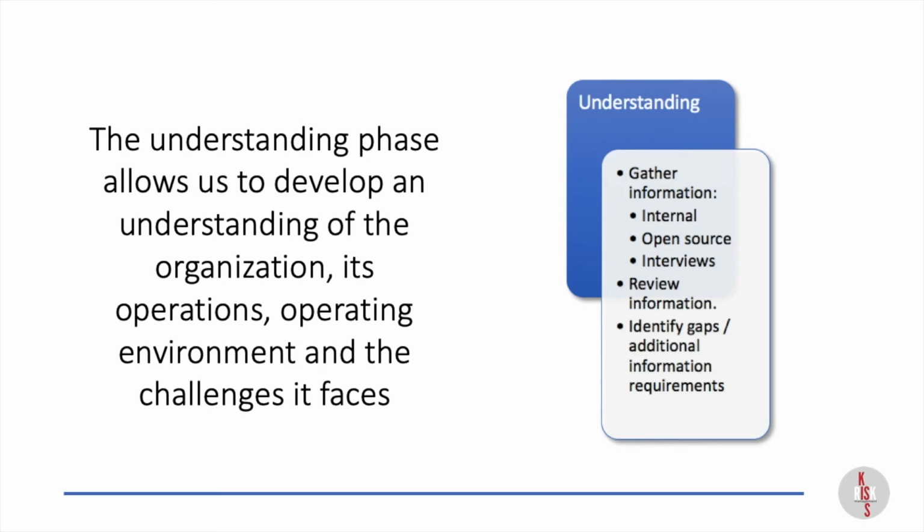Part of this is also to review that information. One of the things that people often overlook is keeping detailed notes and being able to go back and review these. So you are going to be gathering a huge amount of information during this part of the assessment, the understanding phase. So just make sure you're capturing it properly, but then also review it. Review it for gaps and review it for discrepancies.